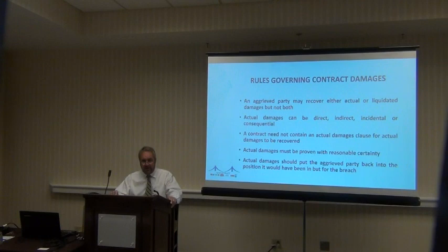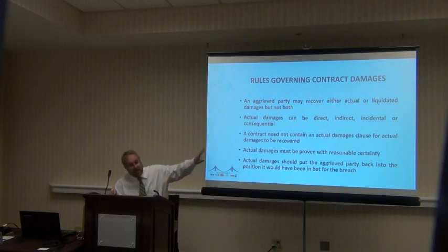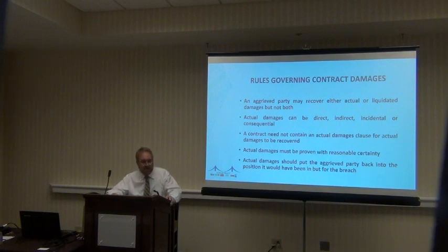If a party breaches a contract, and there is a showing of breach and a showing of damages, whatever kind they are, the furnace, the wiring, the smoke, the downtime, and it can be proved, those are actual damages, and you don't have to have a contract that says I get those things if that sort of thing happens. But if you have a liquidated damage provision, you've given up the right to actual damages. The aggrieved party has.